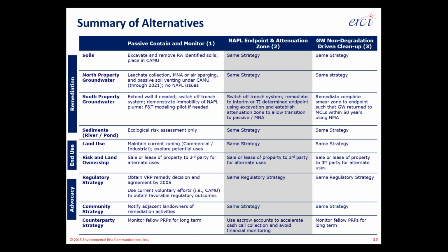Another tool that we find useful is characterizing the strategic alternatives that you have for an individual site, just using a narrative to compare them one to another and show what is in common with each of the strategies that you've identified and what are variables, what you're choosing to do differently from one strategy to another. Not a financial analysis, because that's coming up next, but this is the analysis that frames how you're going to do your costing. If you figure out the cost in one silo, one column here, you can apply that very same set of cost metrics to your other strategies and save time and effort and turn the estimates around faster.